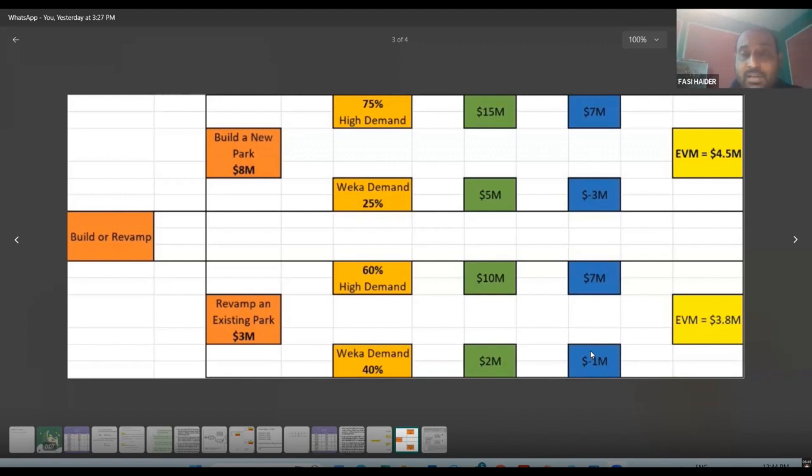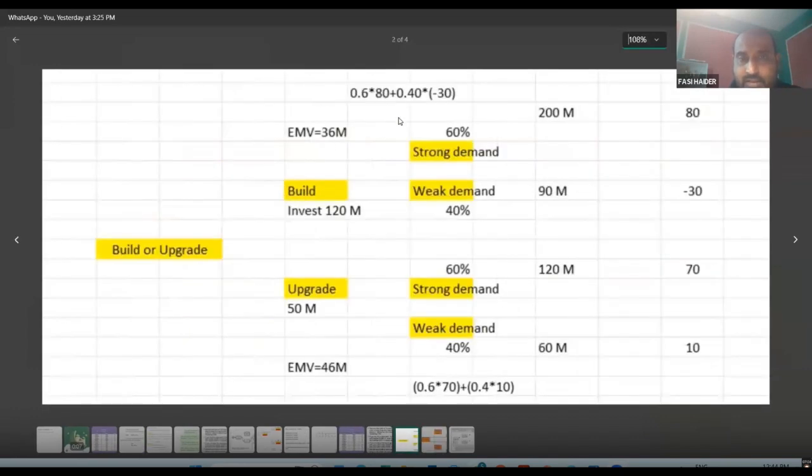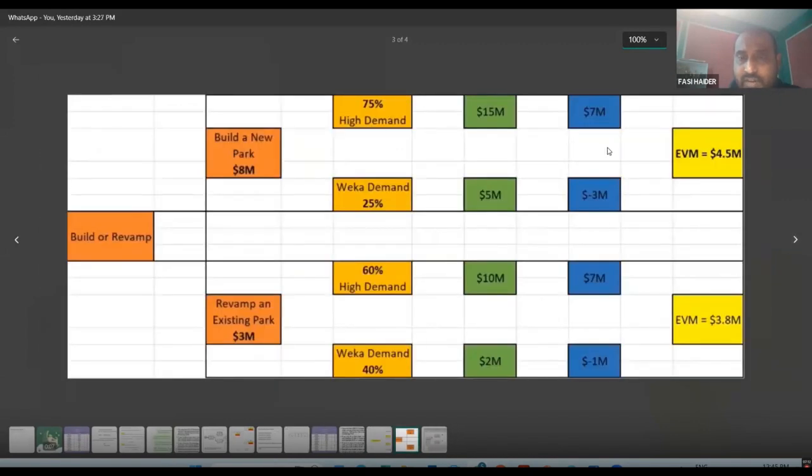Now, if we calculate the earned monetary value, EMV, it is from one of the participant screens I am sharing. So what happens when you do the earned monetary value? You will consider the positive and negative side. So what is the positive side? 0.75, correct? How are we calculating? The change that you are making. So you will do here 0.75 into 7 plus 0.25 into minus 3.